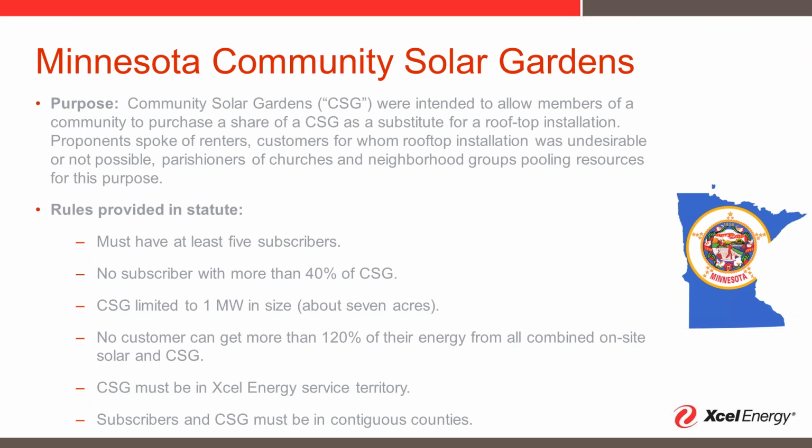In the program, and all of our interconnection practices, the solar developer or the customer causing the cost pays for the upgrades. And so we do have a $1 million cap for co-located projects above 1 megawatt that require distribution upgrades. So we will do up to $1 million of distribution upgrades for those projects, but after that they get a no capacity available without additional upgrades.